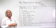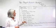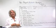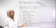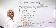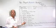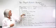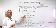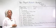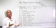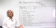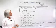Then you want to have your project plan documented. Before the kickoff you're going to have submitted that to different team members, your stakeholders, your change control board — just making sure that it's updated, revised, and finalized before your kickoff. Then you want to be sure you identify your team member roles. You have a register of who's on the team, what organization they represent, and what role they will be playing for the project.